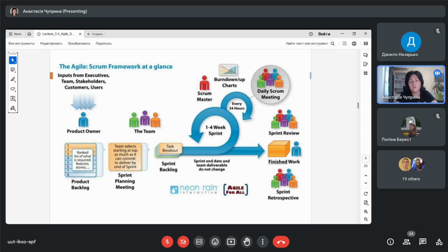I mean, why do we need to have such a gap between two functions? In some period of time, your product owner can give you some updates, can give you some new features for development. And if you have, for example, priority 95 and 90, and you get a new function, you can input it in the product backlog and give it a priority, for example, 93. So it's very convenient to keep this gap between the priorities. It will be very flexible to update the product backlog.